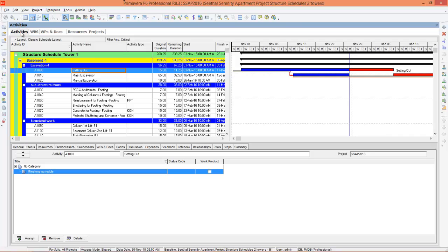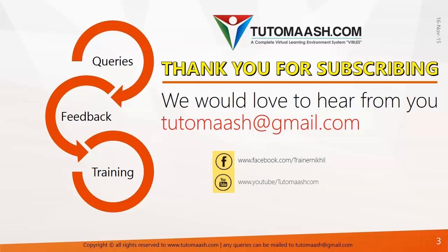This is how we manage documents using Primavera. Likewise you can assign progress photos, tender documents, or whatever documents you want to assign to activities. I think you can do this for managing the drawings - it will be very effective. That's how we manage files. Hope you understood the session. Thank you.